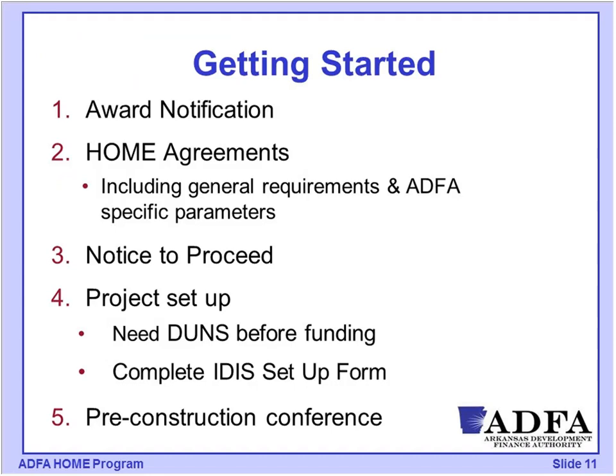So it's also at the point where the environmental review process will begin. That environmental review record will be put together, and ADFA will take that through the process to receive a release of funds for that project. We'll talk later in modules about the other federal requirements, including the environmental review, but just know that projects are not able to go forward until that environmental review has been completed.